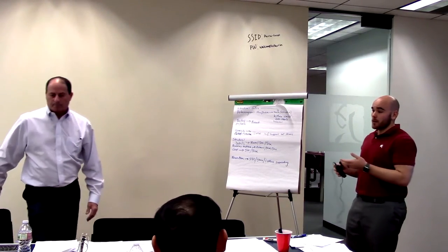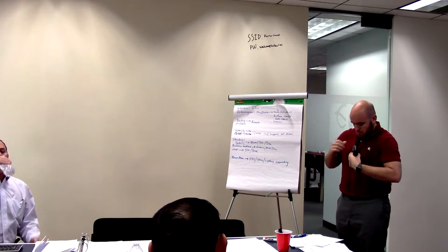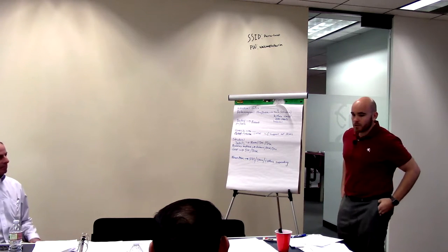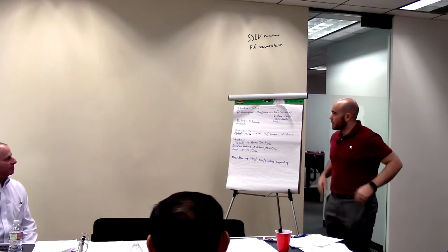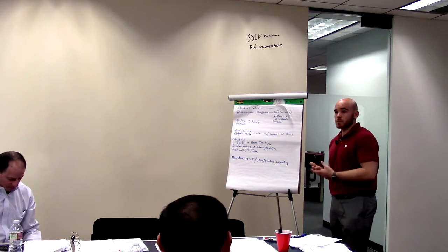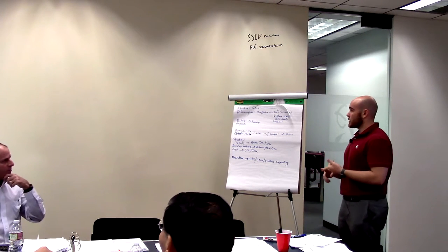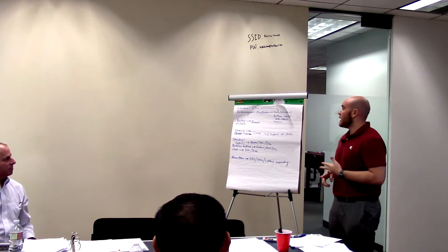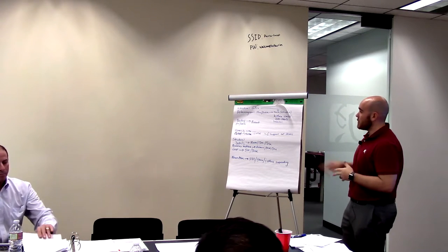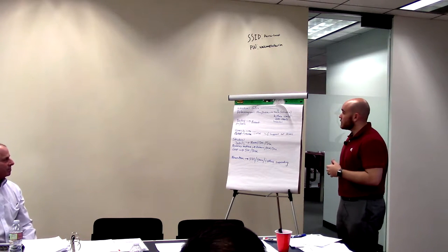So I think we have a pretty good team. We did identify that we are lacking for the retaining wall design. Maria, I believe she only had 3 years of experience in structurals. Even though she wants to be a structural engineer, we felt that it would be best to hire a structural sub to come up with the calculations and the retaining wall design, and then Maria can assist that sub with the plan and profile and the structural details and maybe even some of the calculations. That way she could get that mentorship from someone outside of the office that has that experience.